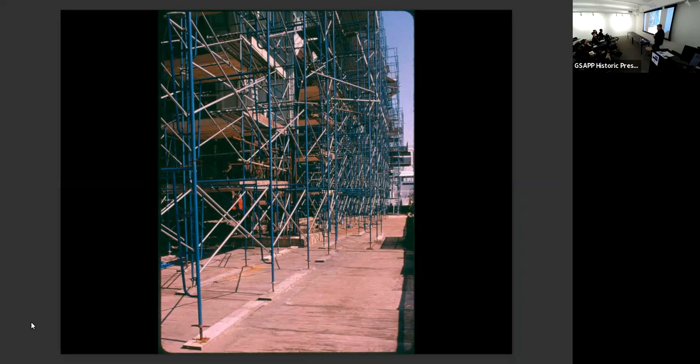The two and the three and the R and the N tunnels are directly underneath the building. So we couldn't put weight on anything except portions of the original building. So it took 18 months to get the scaffolding erected. Anyway, if you work in New York, you'll get used to this. You'll get used to it.